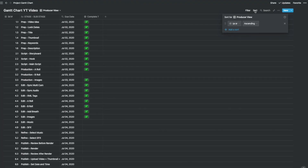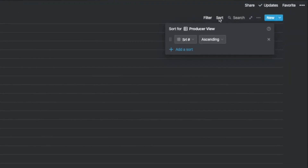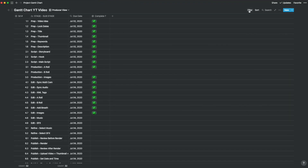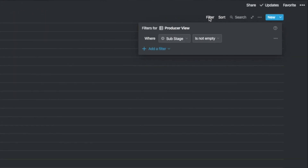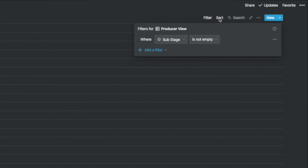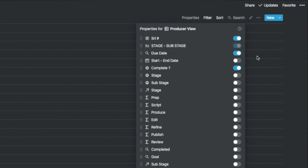In the producer view, we sort the serial number in ascending order, and the filter is set to substage not empty, to highlight only the activities and not the rolled-up tasks. The only two columns we want here are the default stage-substage column to signify the stage and activities combination, and the complete select column.